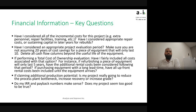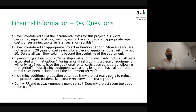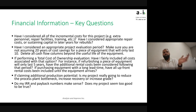For financial information, key questions include: have you looked at all incremental costs for the project — extra personnel, repair facilities, training? It's not just about capital equipment. Have we considered appropriate repair costs and sustaining capital in later years? Maybe if you're changing a piece of equipment or process, what sustaining capital will be needed? Have we considered an appropriate project evaluation period — for instance, 20 years of costs for equipment that will only last 10 years is obviously not correct. If performing a total cost of ownership evaluation, have we looked at all costs associated with that option? For example, if refurbishing equipment that only lasts five years but the project life is 10 years, the additional rental costs for the remaining five years should be included.